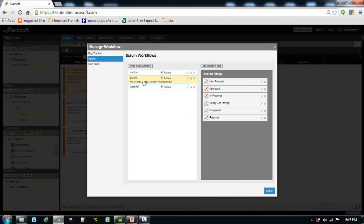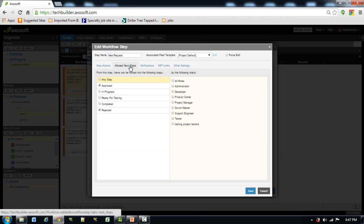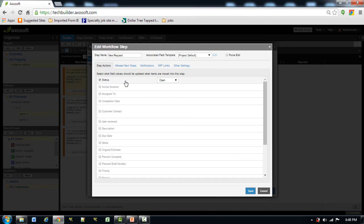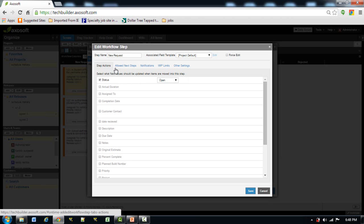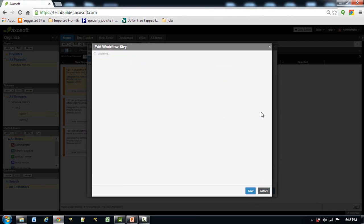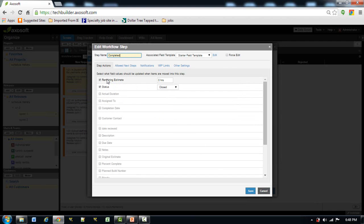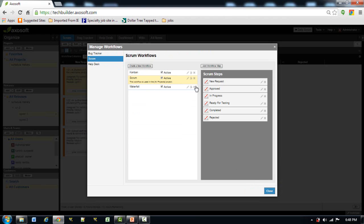Here we see three workflows. We go to Scrum — in Scrum we can rename, edit, or delete the workflow and create a new one. I'm going to edit the current workflow. In a workflow step we can add a new step or edit the current one. Under Allowed Next Step, from New Request it can go to Approved or Rejected, actioned by the product owner. I've already edited these workflow steps to match the diagram. Under Step Options, when entering a step the status changes — for example, status becomes Open. When going to Complete, status becomes Closed and remaining estimate becomes zero since no more work is needed.